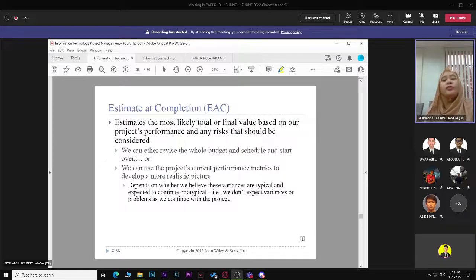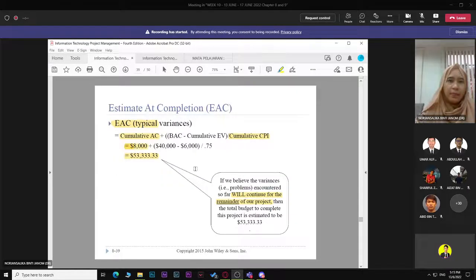So now you want to counter back. You want to make sure that your plan for month 1, you already lost. So for month 2, month 3, month 4, you want to make a correct calculation and make sure it aligns with what it's supposed to be. So you have estimate at completion. You recalculate how much budget is needed to complete the project accordingly.